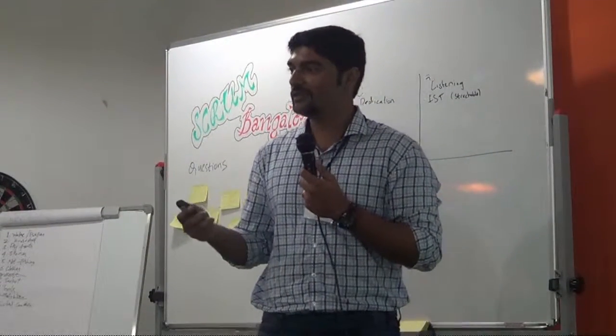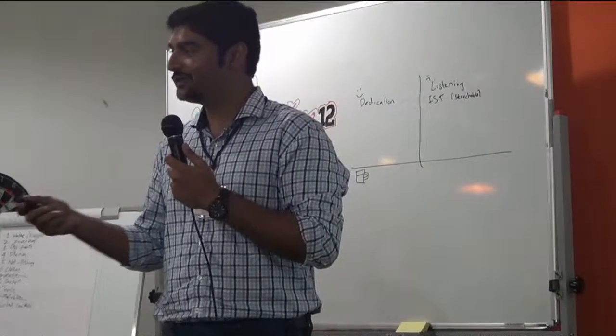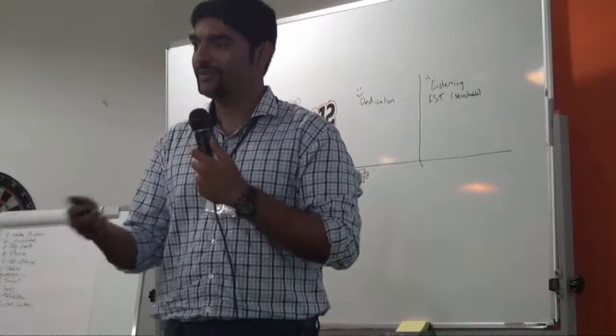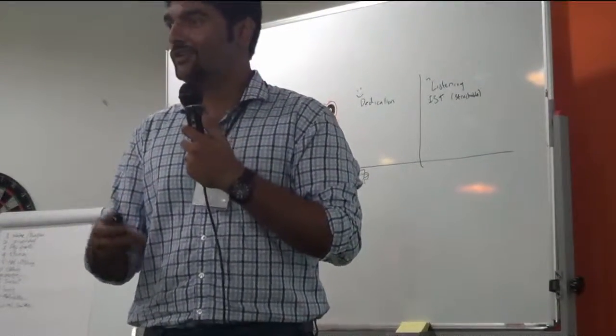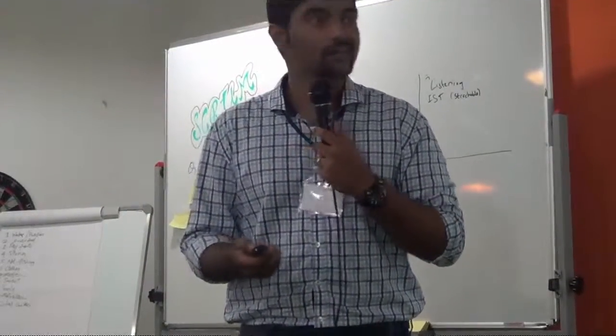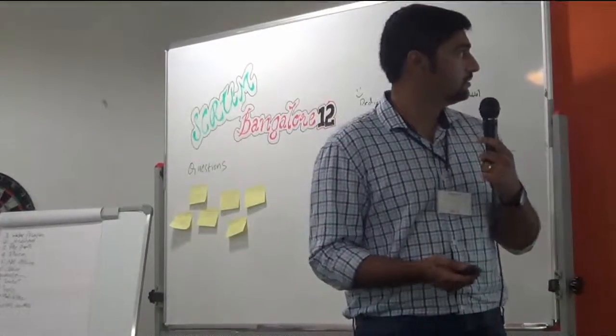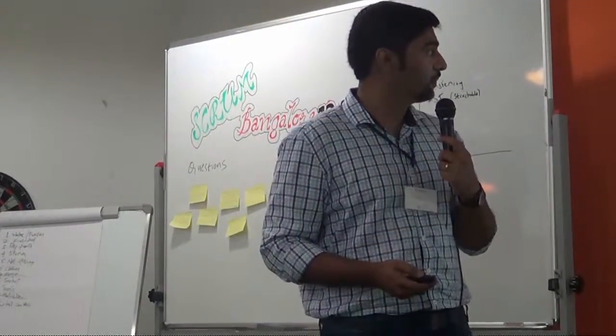Right? So let's say you plan too much in the release. You're going to end up pushing the team to do more stuff. And when they fail, it reflects badly on you as well. And similarly, if you plan too little, you're telling the stakeholders that they're not getting the value for their money. And the wrong expectations, again, relate to the same point as well.